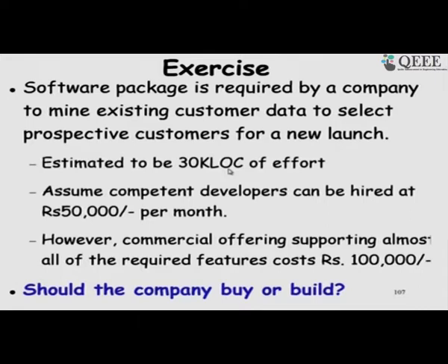Have they worked on similar things, or are they totally novice developers, not having worked on any team, forget about similar software. But if they are highly experienced and have developed such software, we can consider this as organic software.